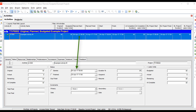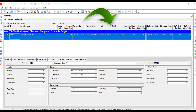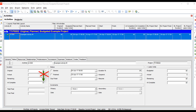The plan start and plan finish fields are also located in the status tab, and they're equivalent to the start and finish fields. Before you mark an activity as started, plan start and plan finish equal start and finish. Once you mark an activity as started, they separate. Plan start and plan finish become independent, while start and finish are updated with actual starts or actual finishes. Also, when you mark an activity as started, original duration separates from at completion duration, and budgeted labor units separates from at completion labor units.